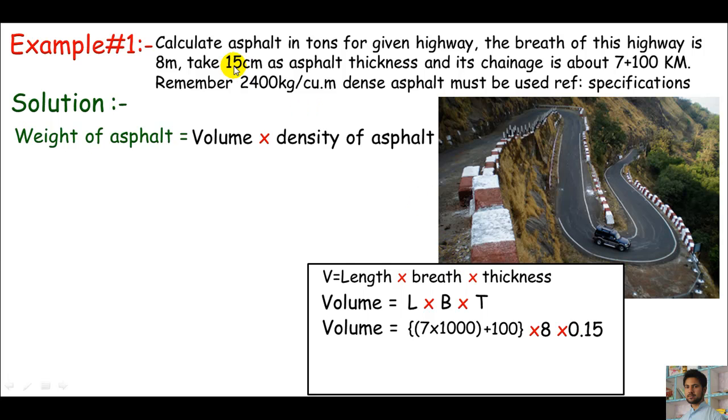Plug and chug. When you calculate, 7 times 1000 gives you 7000 plus 100, which means 7100 meters. This is the length of this highway in hilly area. Times breadth which is 8, times 0.15 which is thickness. You get 8520 cubic meters. Yes, this is the volume.